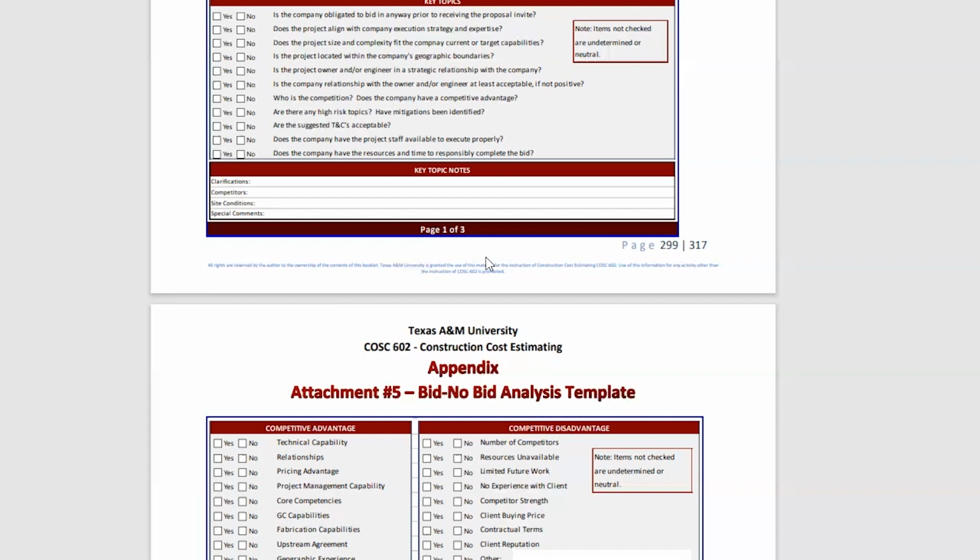What I found is that most of the time in the negotiation process, after I was out of it, as it proceeded and I was no longer in it, those qualifications were moved to the side. They got removed from the table, but the money that needed to go in the estimate to cover them was never added, and that becomes a problem.